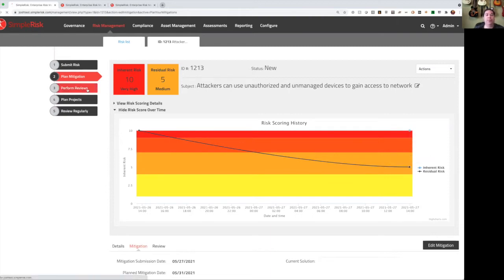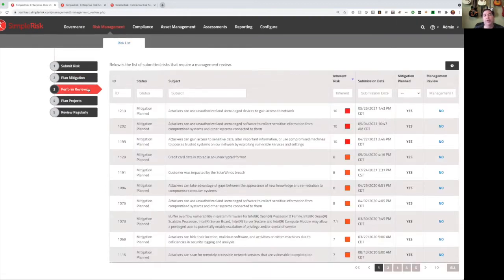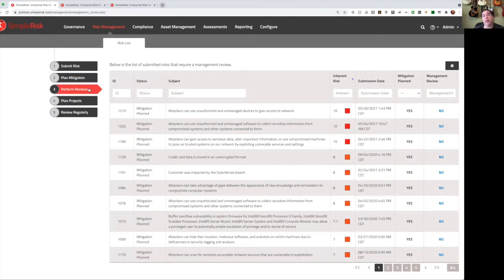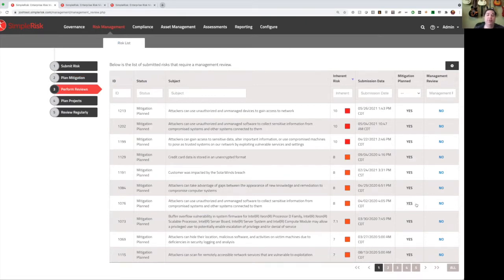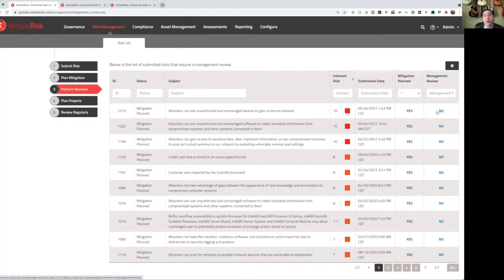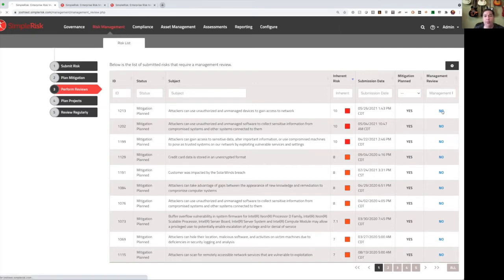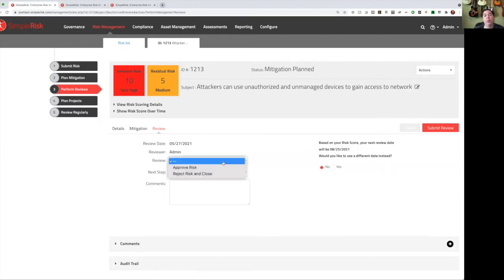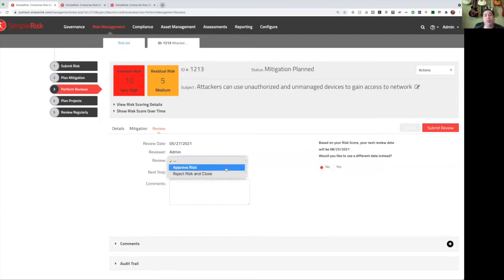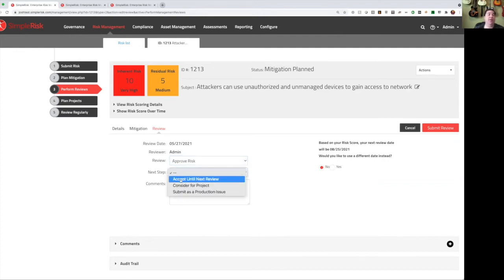In terms of performing reviews, this view looks very similar to plan mitigation, but the big difference here is it is showing us a list of every risk that does not have a management review performed for it yet, still ordered by the highest inherent risk score on down. So we simply start at the top and click on no. This will bring us to the page to perform the review. What is our review? Do we want to approve this risk or do we want to reject it and close it? If we approve the risk, what's our next step? Do we accept until next review, kick the can down the road? Do we consider this for a project, in which case we can select from the existing project or create a new one? Or do we submit this as a production issue and leverage an external system for that process?